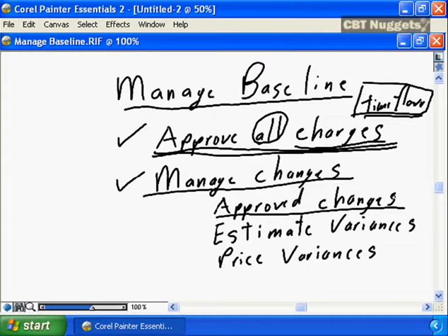When it's an approved change, it is actually a physical change to the project baseline. If through the change management process you have added incremental value to the project of an additional $15,000, the baseline is now $15,000 greater than the original project baseline. Changes, in fact, do change the baseline. If it's an approved change, you change the baseline, you therefore have a different yardstick within which your project is being measured. So those are the easy budget changes to deal with, the approved changes, because they in fact change your project baseline.